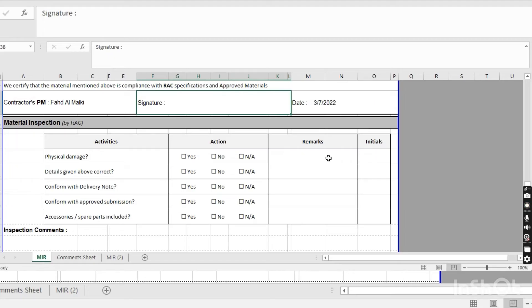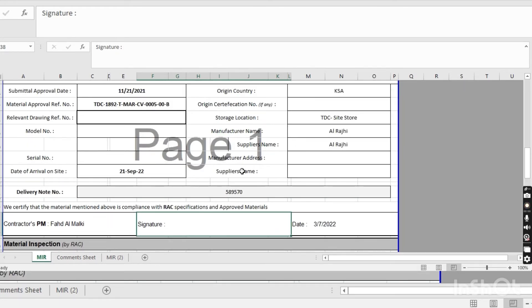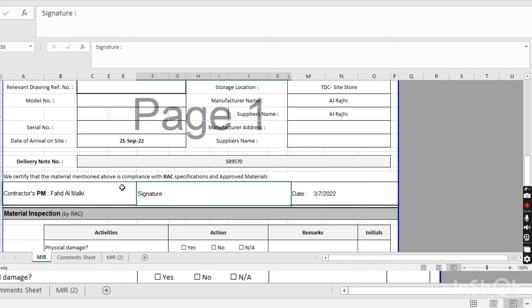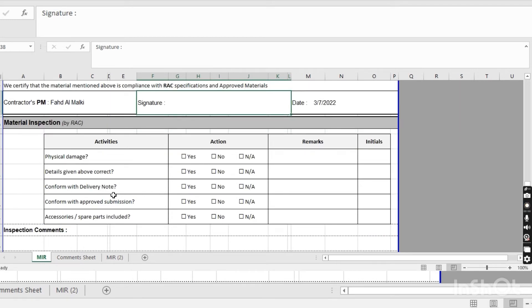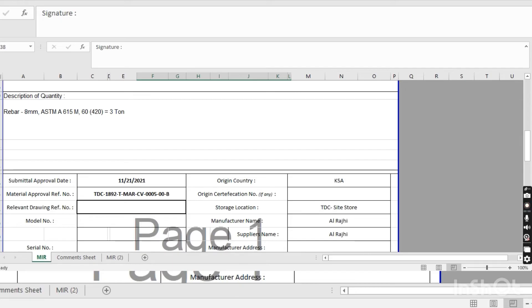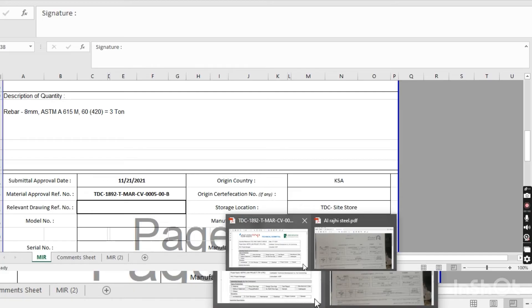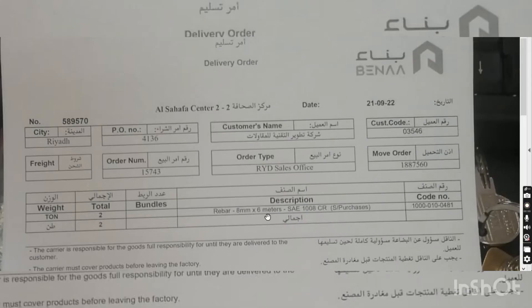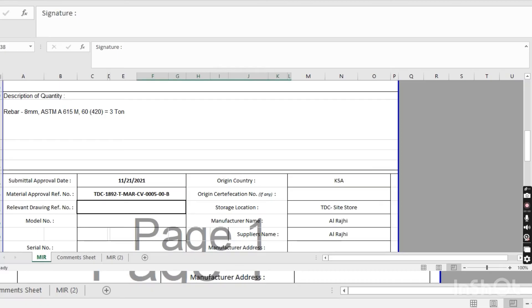If you are not doing internal pre-inspection, all this area is for the consultant to fill. 'Detail given above correct' — if everything is correct, he will click yes. 'Confirm with delivery note' — he will confirm it with the delivery note. We have three tons here: two tons on one delivery note and one ton on another, so three tons total. He confirms this against the delivery note.